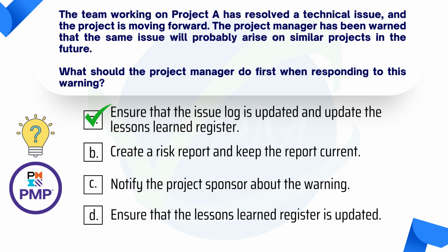Okay, so answer A. You do want to ensure that the issue log is updated because you're saying that you resolved a technical issue, so you do need to ensure that the issue log is updated. And then because of the similar projects in the future, you do want to update the lessons learned register. So therefore it's both, and it's two things that you want to do there.